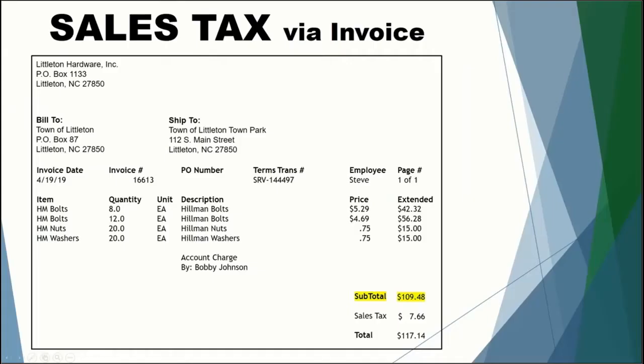The next thing we'll talk about is sales tax. Sales tax is pretty easily identified when you're working with a general invoice. You'll see your items listed, a subtotal, sales tax, and then the grand total. In this case, you only want to use the subtotal figure to go on your DER, since PARTF does not reimburse for sales tax.